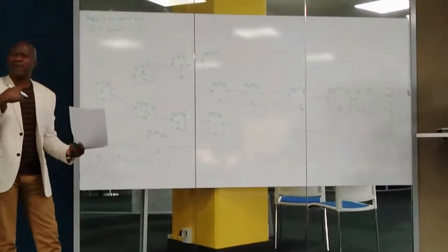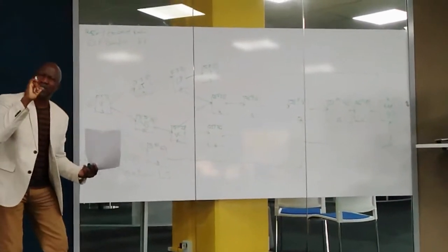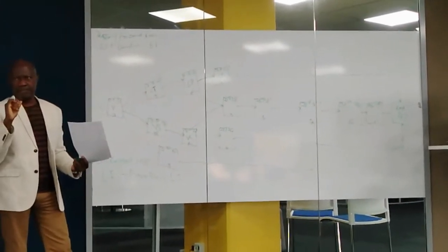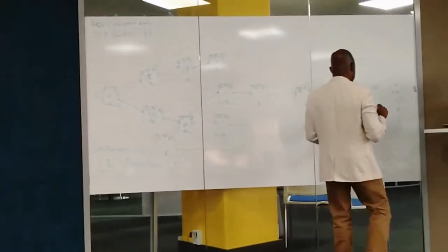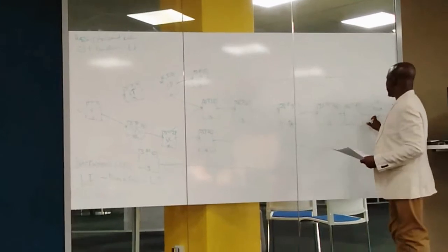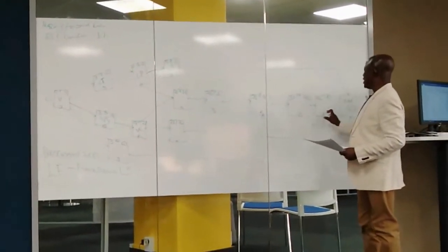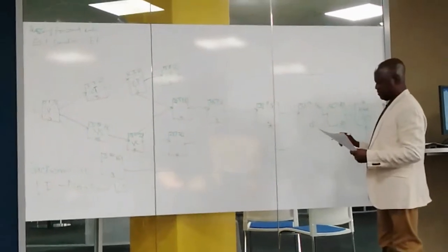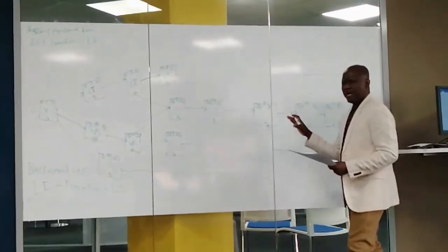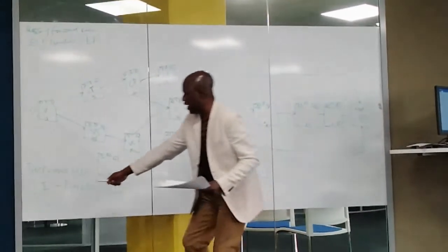Remember, when you are walking back, you are taking the minimum day. So when we are walking back now, we have 47 days here. So we only bring this 47 down here. When we are walking back, we are deducting. Look at the formula.